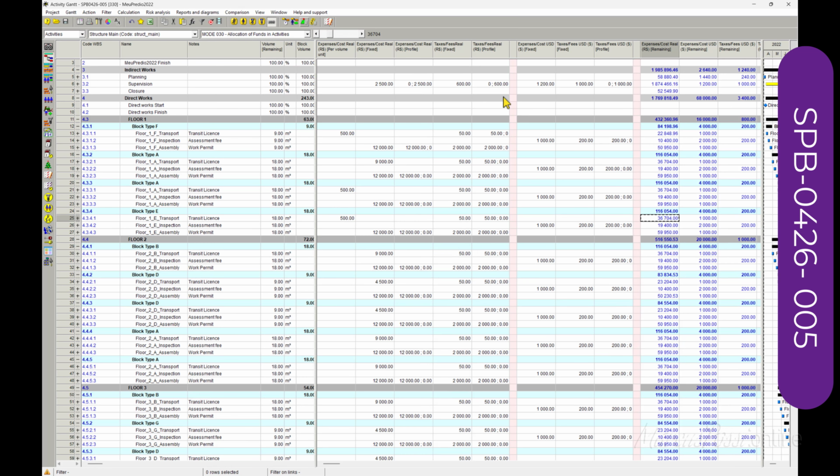36,000. Okay, you have just to fix this idea, not fix it by your calculation, but the software calculation per value. Imagine if you change your volume here to 100, you expect that this cost change automatically, not by your own individual calculation.